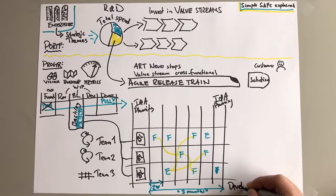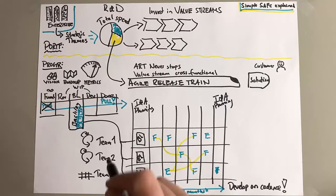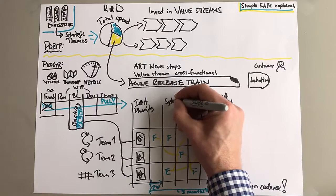We have the low level Scrum time boxes of two week sprints, and the whole team of teams, they also work in the time box - they sprint in program sprints or program increments. And that's a three month time box in this case, quarters as I was saying. So you develop on a cadence.